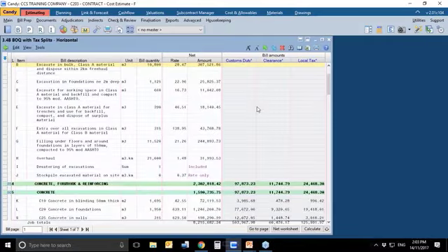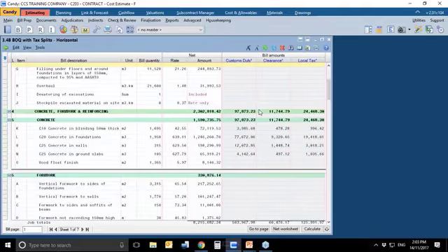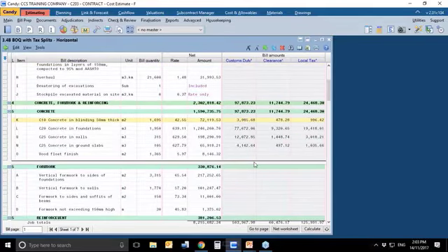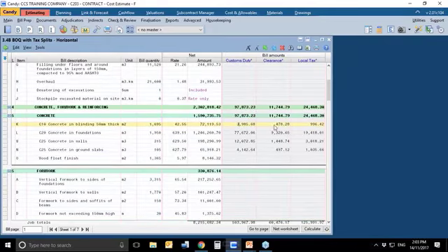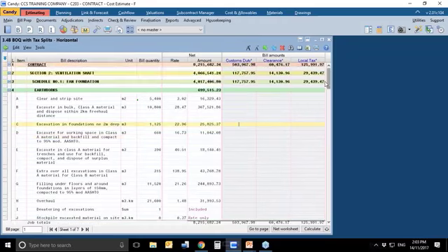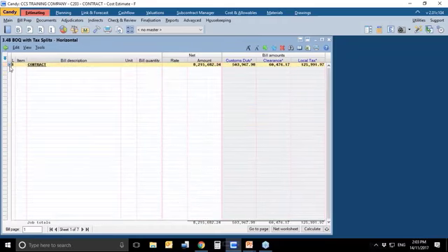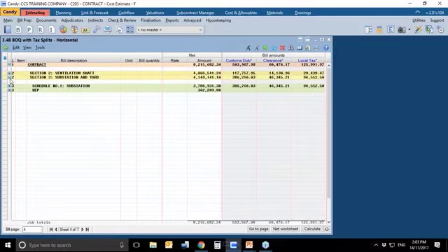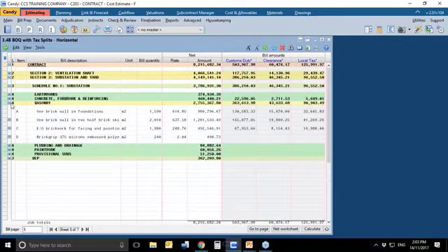Let's have a look at your concrete. We've got tax applied on concrete. It tells you how much money you would be spending for that item, customs duty, clearance, and so on, and the totals on this project. How much money would you be spending in all on this project? You'll be spending 503,000 dirhams on customs duty, so much on clearance and local taxes. And you could also get the total against your heading levels. So if you were to look at how much I am paying on tax for my masonry items, there you go, the analysis.